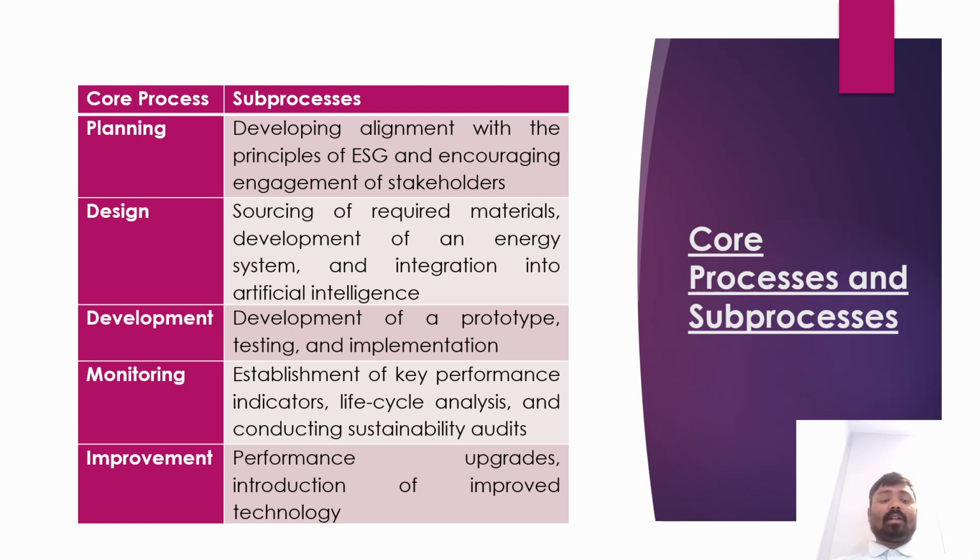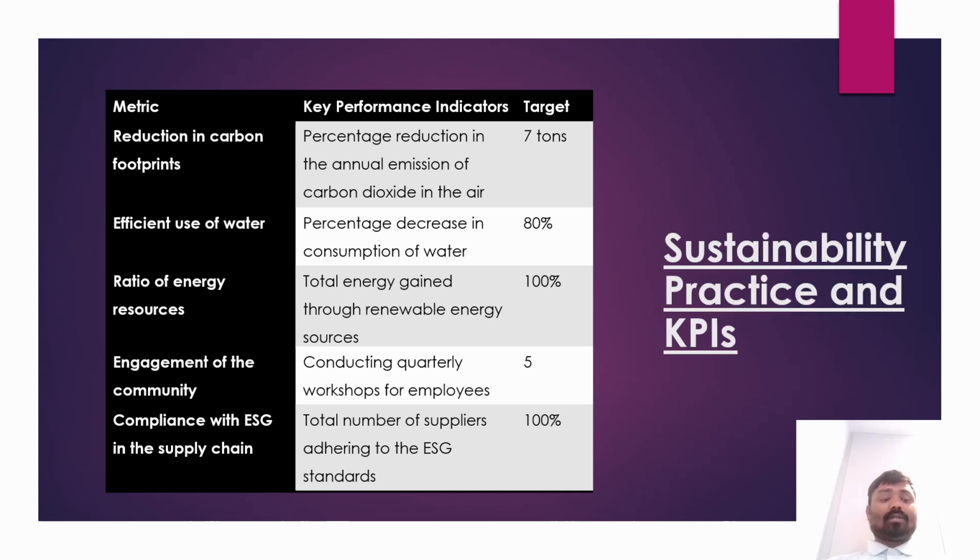Talking about the stakeholders and swim lanes, let's talk about people. Along the left side, I added vertical swim lanes for our 5 stakeholder groups: municipal authorities, local communities, suppliers, the technical team, and investors. Within each lane, I mapped their touchpoints. Examples: city permits, community workshops, supplier audits, sprint reviews, and quarterly ESG briefings. This visually enforces accountability. You can't miss who is responsible for what or when to loop someone in.